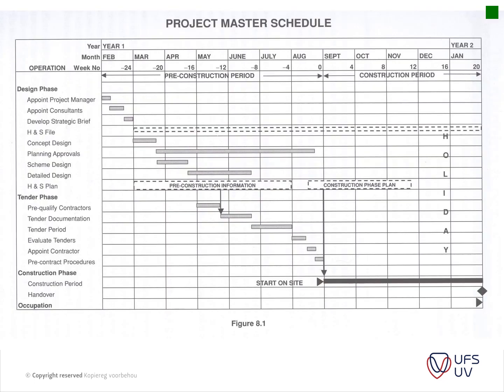Here's an example of a project master schedule. You have your design phase, tender phase, construction phase, and occupation. This is an extract from the book so they're not working on our six stages, but you can use these types of schedules in your different stages as needed. You can see they use negative dates on the timeline up to the point where the contractor gets onto site — that's more advanced and not necessary for you to do.